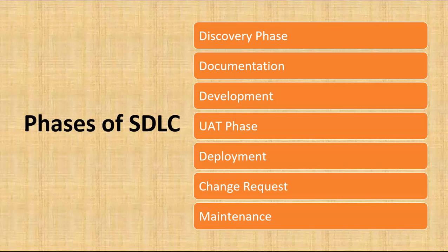In the testing stage, usually we do have testers, or if you're not having the testing stage, BA is the responsible person to do the testing. So what testing does he do? Whatever the developer team has developed as the robot, you create the test scenarios, take the test data, take your PDD, create the test scenarios and test cases from each and every step, and compare the testing.